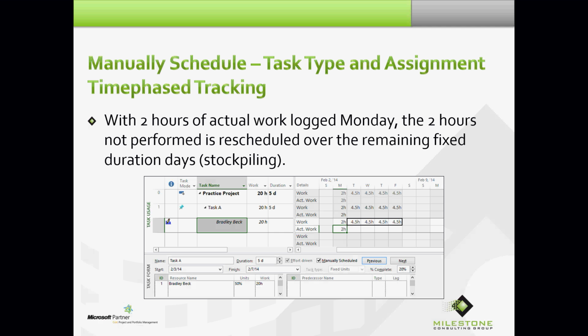It's not reason for someone to stand on stage and say, look, now you're in complete control. You enter in something and nothing else changes. Well, something did change. The requirement on the resource just went up right here every single day of the last 4 days. So you can never believe it when somebody says, look, you key in something and nothing else changes.